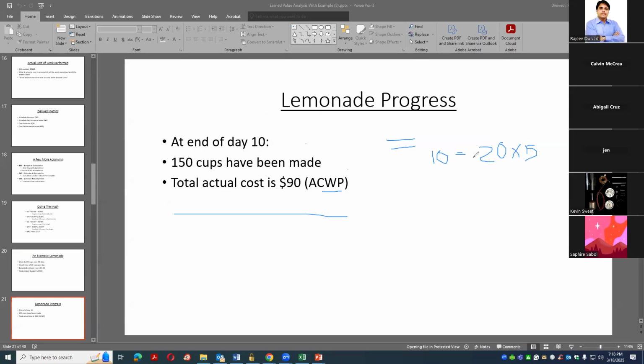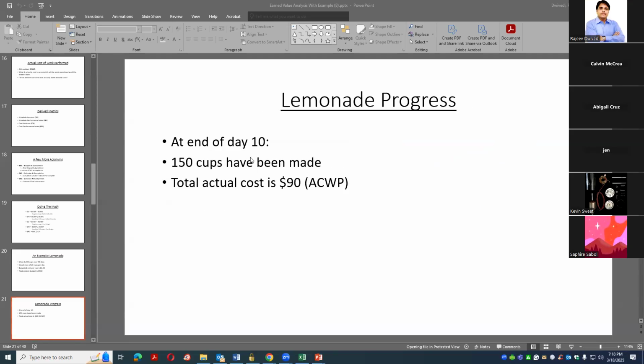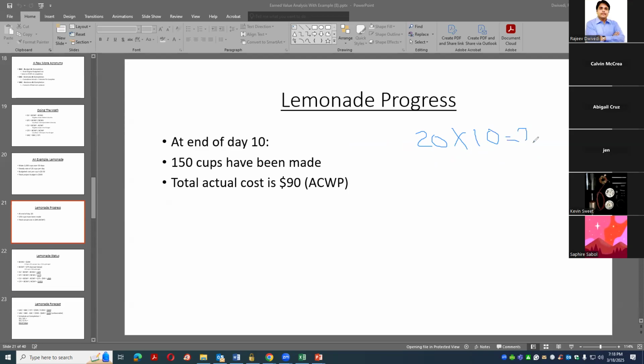Sorry, 50 cups per day. Sorry, if I'm correct, I just have to see. Yeah, sorry, 50 days, 20 cups per day. So what we need to know is three numbers. 20 cups per day, so we have 10 days, which is 200 cups. Each costs 50 cents.